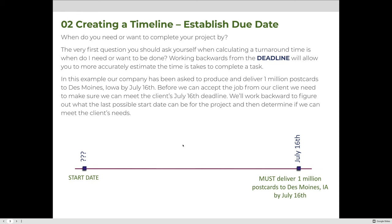In this example, our company has been asked to produce and deliver 1 million postcards to Des Moines, Iowa by July 16th. Before we can accept this job from our client, we need to make sure that we can in fact meet the July 16th deadline. We'll work backward to figure out what the last possible start date can be for the project, and then based on that start date, we can determine if we can or cannot meet the client's needs.